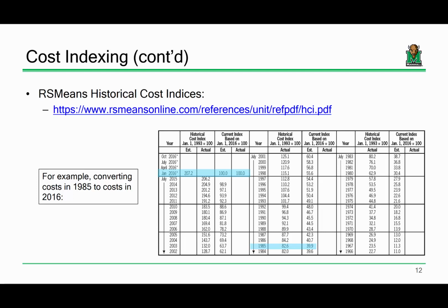The idea that if you're talking about a product where the price is volatile and it can change a little bit, I would say in real world cost estimation, I probably wouldn't use cost data from the 60s if I could use cost data from 3 or 4 years ago. Now, that being said, cost data from 3 or 4 years ago is fine as long as it's properly indexed. Another point I would mention, and we're going to talk about this here at the end, but